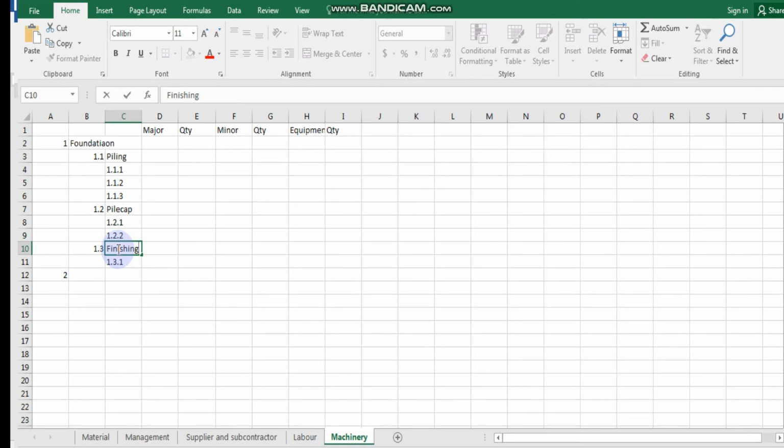And then you can also do it in a hierarchy format, which we will also use for product breakdown. If you have a pen, a handphone, a bottle, something more product based, then you will use a hierarchical kind of format. And of course Dr. Lee was going to tell you the column format. She usually shows it in the column format. So you have one column for layer 1, one column for layer 2, one column for layer 3, one column for layer 4, something like that. So she will have layer 1, layer 2, layer 3, and then details if necessary, or remarks if necessary.